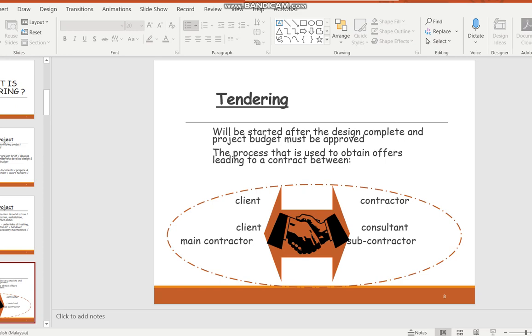It can start during the conceptual stage, but that will be a more negotiated form of contracting, maybe using the negotiated tendering method, or with proposal. It can be a design and build kind of concept, whereby you get the tenderer to come in early and do the brief designs, and later on offer the price and all that.